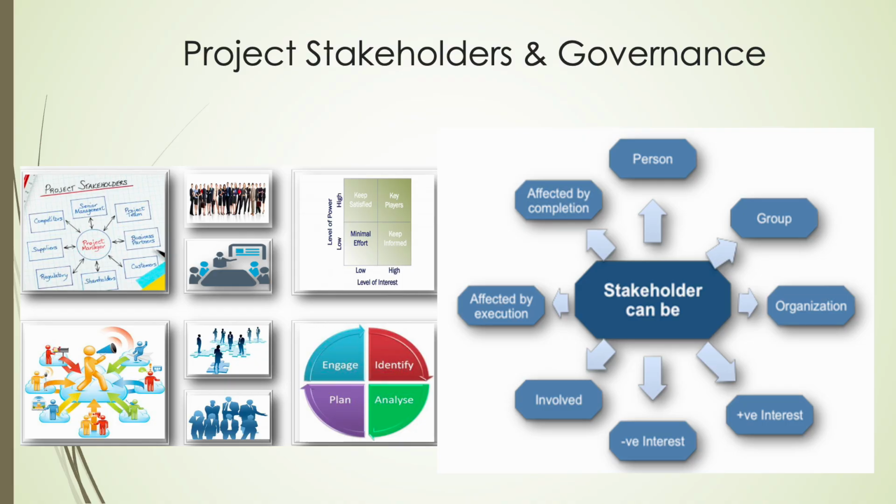Stakeholder management is not a one-time task, it requires continual assessment and adjustment. The engagement process follows a clear cycle: identify stakeholders, analyze their needs and influence, plan effective engagement approaches, and finally engage and communicate proactively. Engagement levels, tracked from unaware to resistant, neutral, supportive, and leading, help the team tailor communication and involvement strategies. Inputs like the stakeholder register, decision-making analyses, and feedback mechanisms inform ongoing adjustments, while outputs like change requests and updates to communication plans ensure alignment.